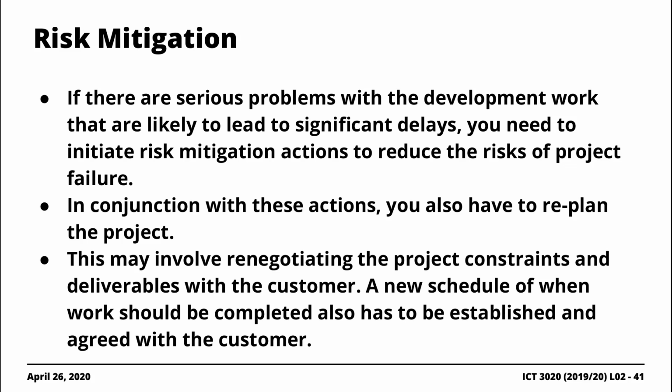You negotiate features associated with the software project. So maybe you go to your customer and say, you know what, we initially said we were going to incorporate this particular feature into the software system, but perhaps it will not be possible right now. Maybe we can defer this to a later stage. Once you negotiate with your customers, it might be necessary for you to come up with a revised schedule of the work.